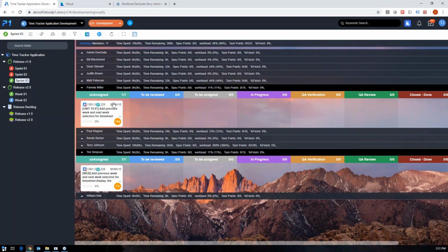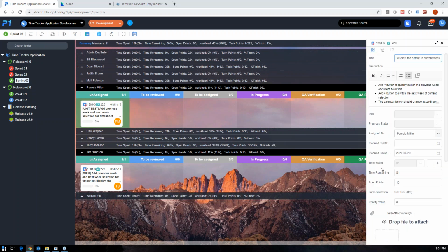then you can easily determine the workload because on each of these tasks you're either putting in how much time is remaining, right? And how much time is spent, things like that. So if you use this to calculate against capacity, you therefore have your workload. It's a real straightforward formula, nothing complicated there. But this is how you would actually work through your daily tasks, right?